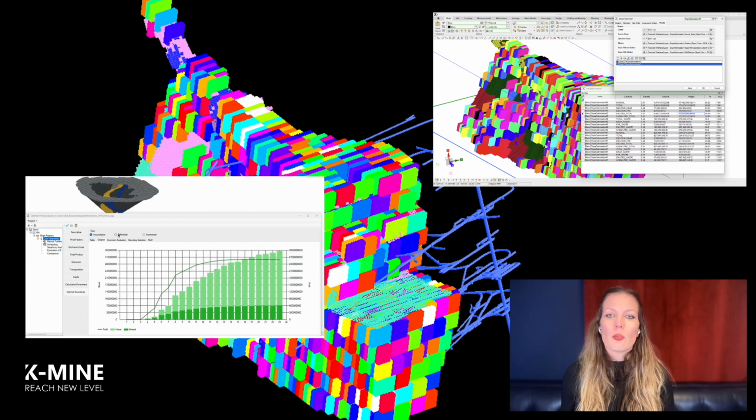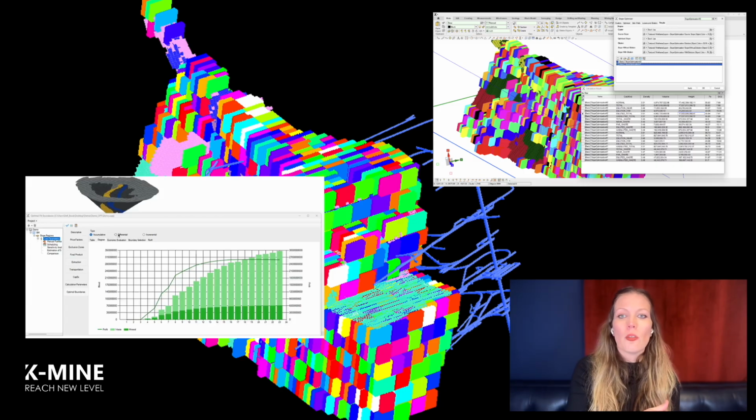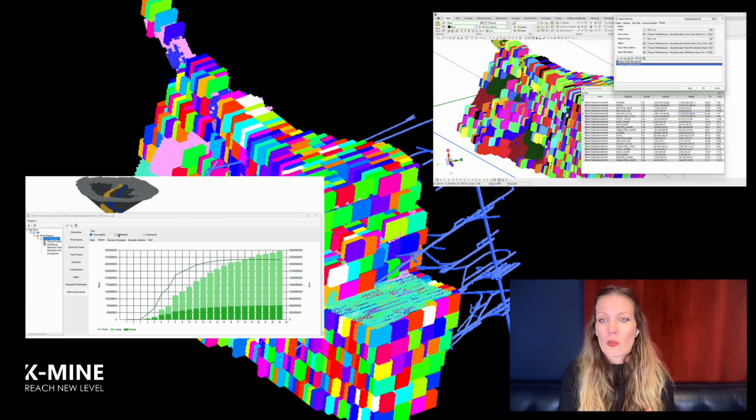So to do that, the project schedule is optimized. Open pit might run at higher output for a while, then taper off as the underground mine ramps up. The idea is to keep metal production steady because any downtime cuts into NPV due to discounting. Modern tools like mixed integer programming models help with that. They show which ore blocks should be mined from the surface and which ones should be saved for underground.